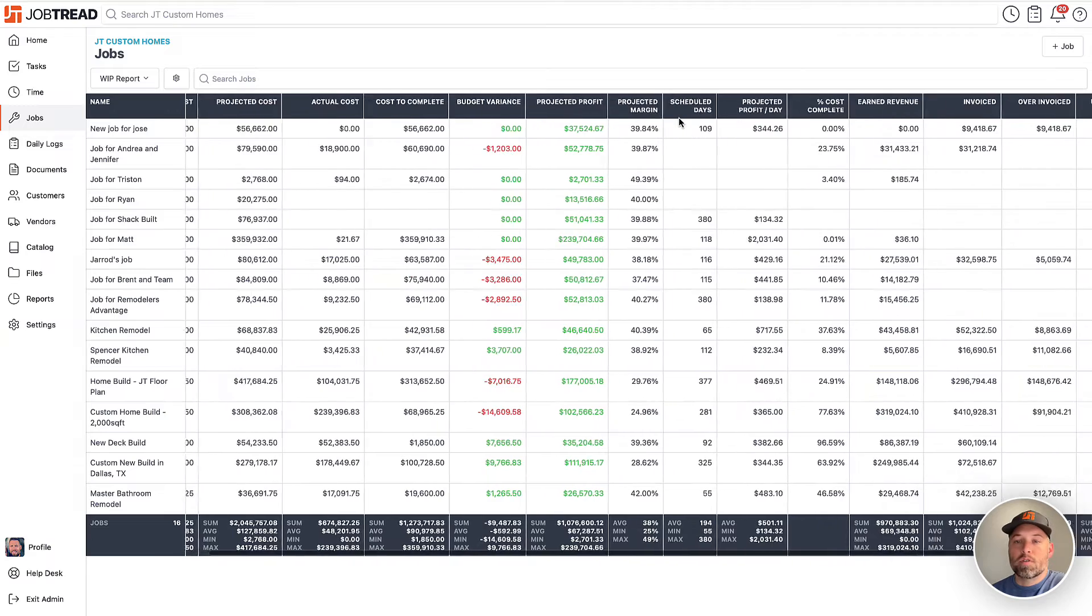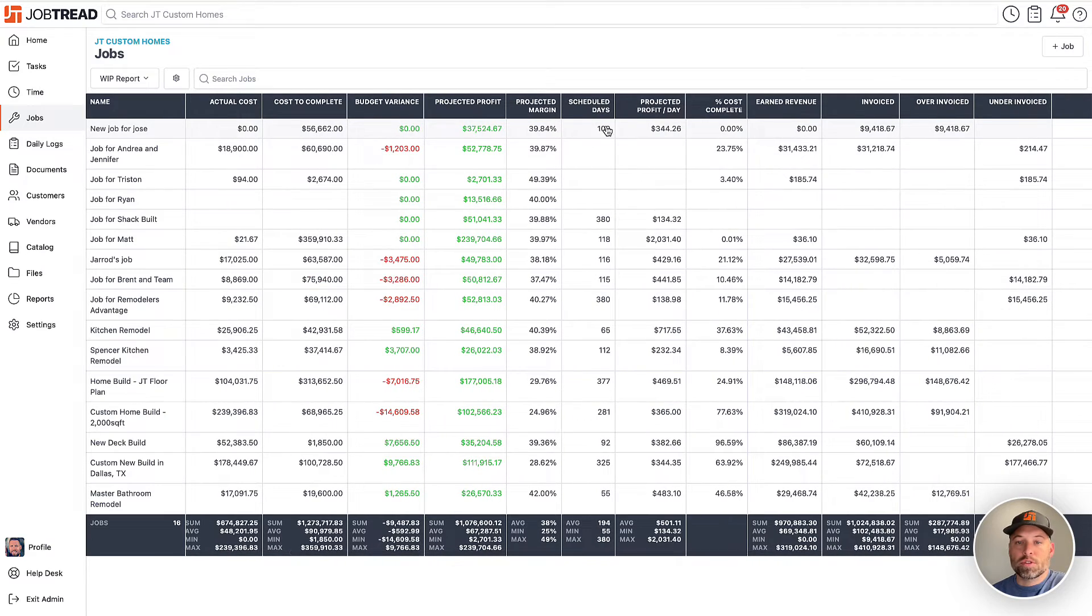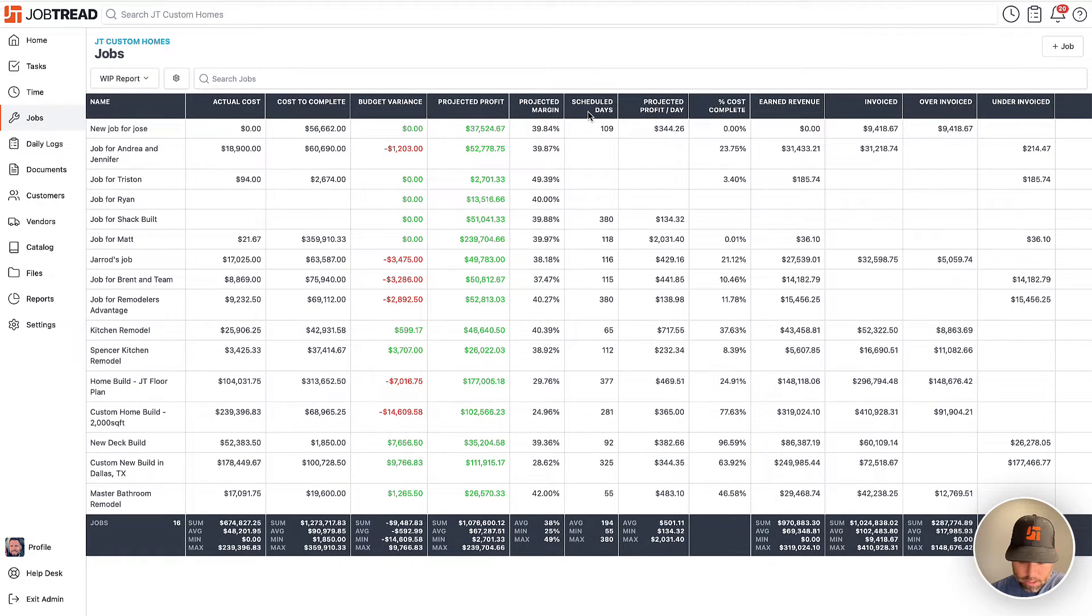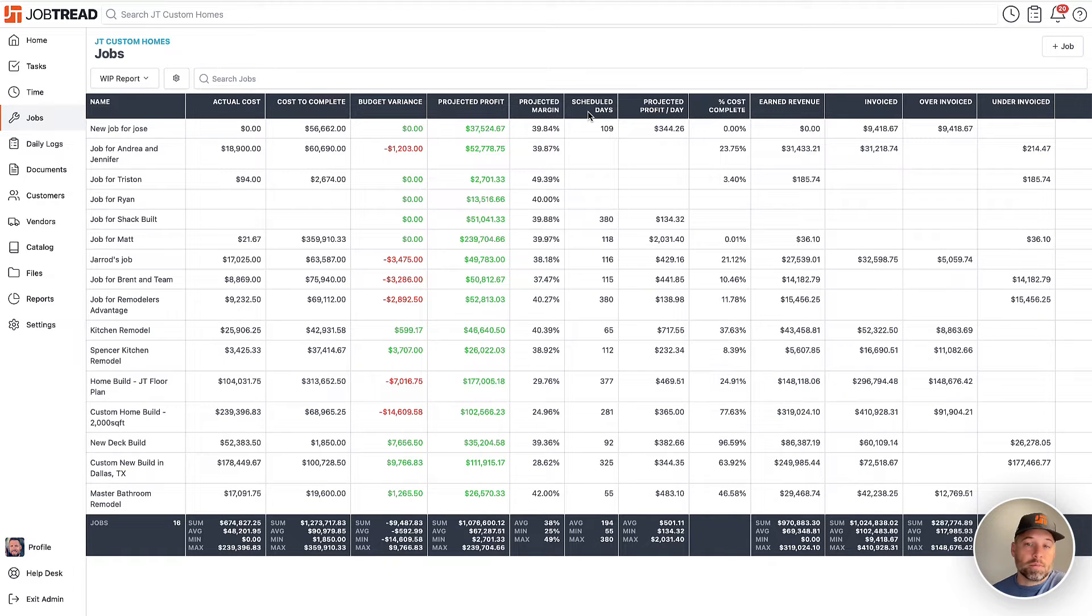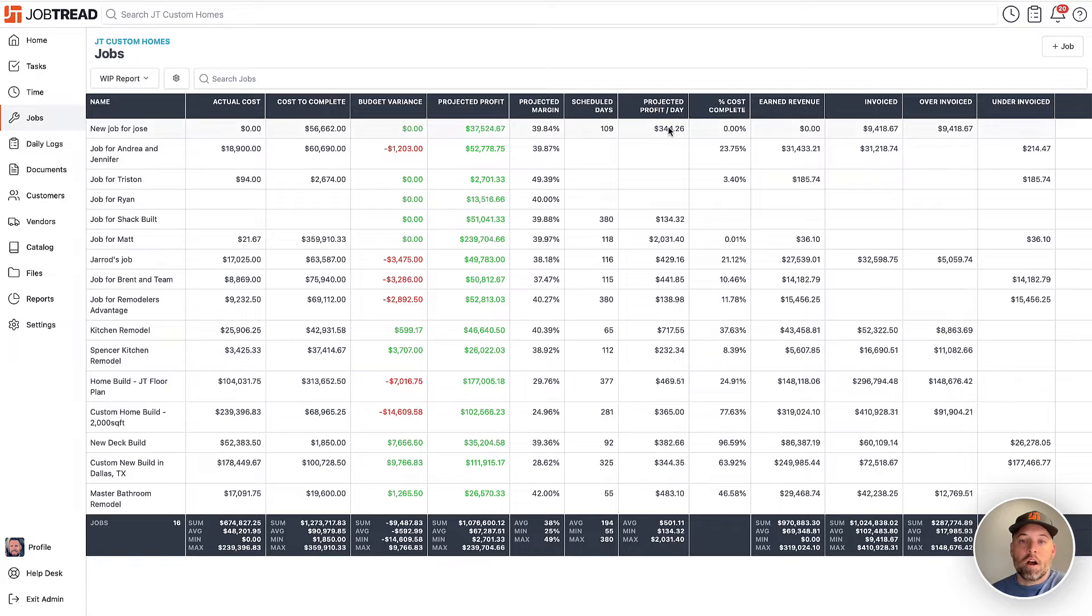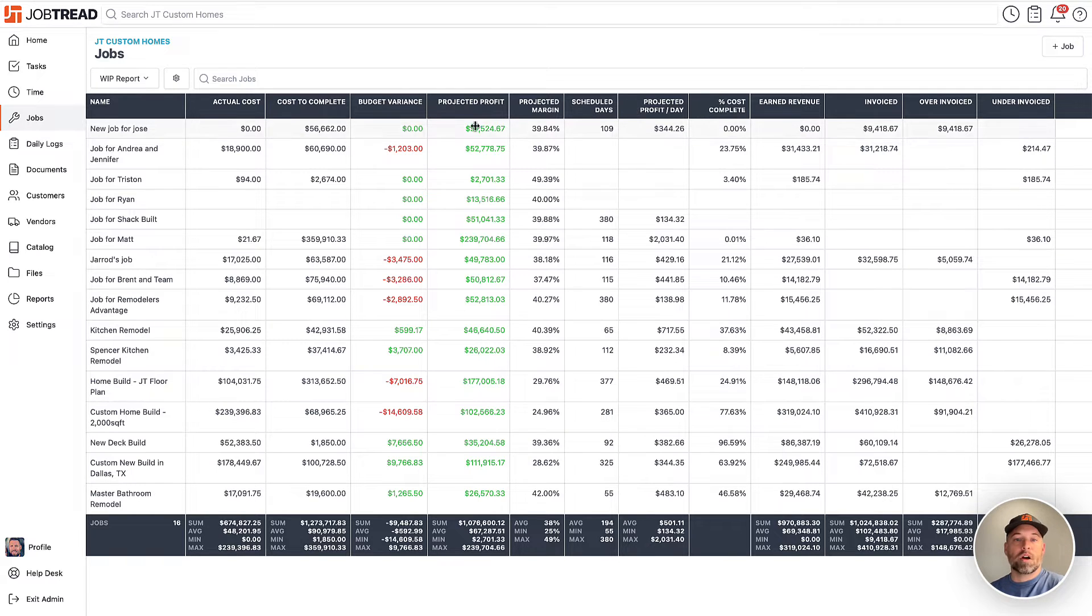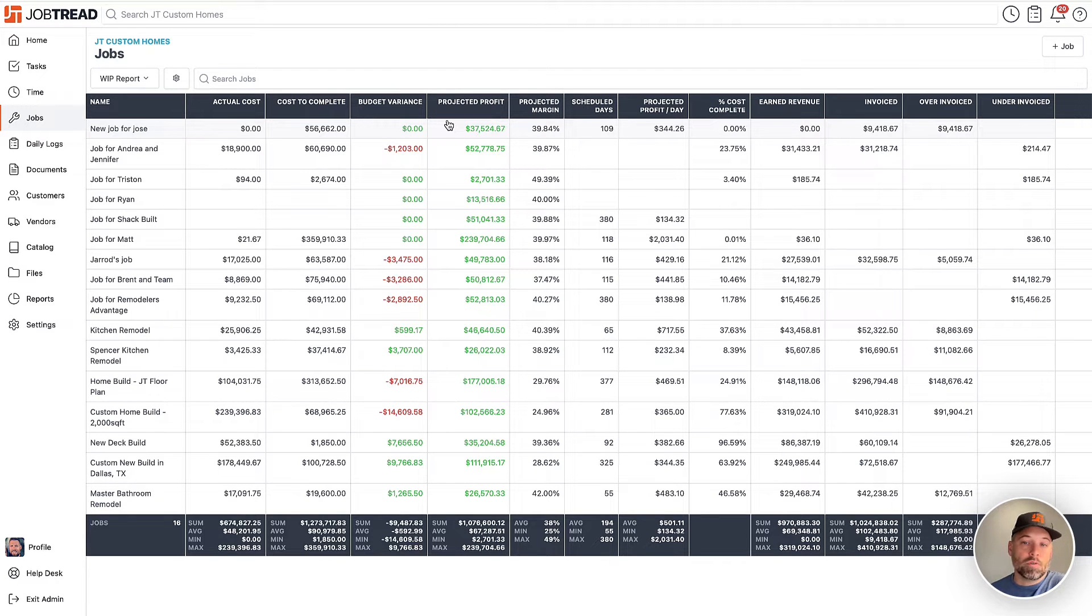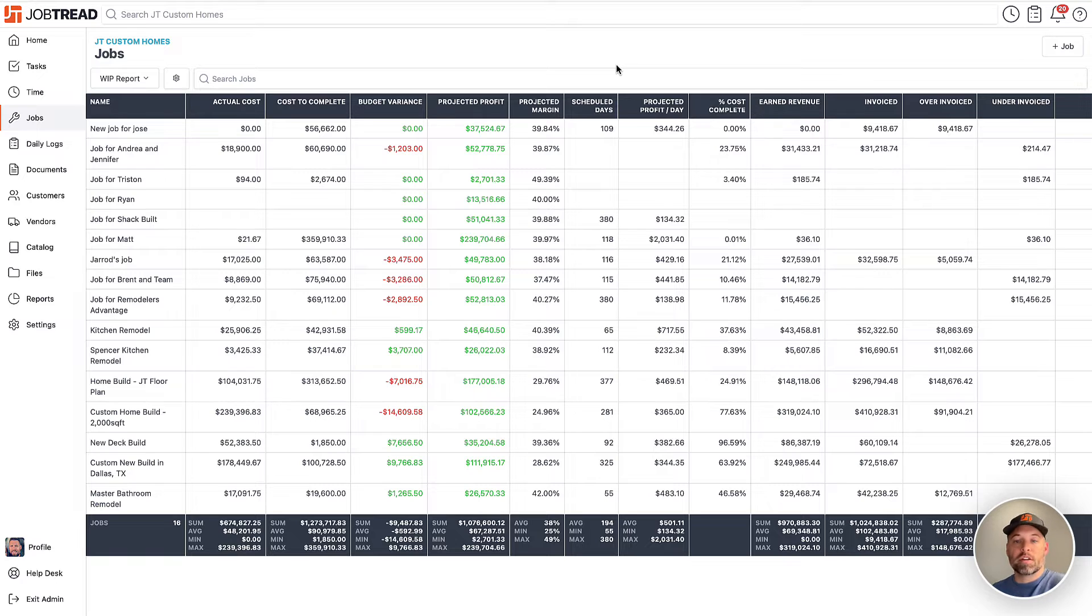Moving on from there, this is new. So we have the scheduled days. Scheduled days is the number of days from the start and end of this particular job. And it's going to take the profit per day. So it's going to take that projected profit on the job and divide it amongst the number of days that are left. And then that will actually show you, relative to all the other projects, how much you're intending to profit each day on that job.